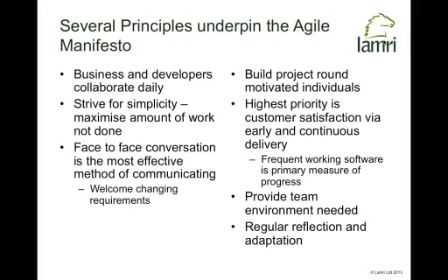Face-to-face communication is the most effective way of communicating. So this is kind of a welcome conversation and collaboration, and it's not traditional project collaboration. Collaboration tends to be high at the very beginning of the project, drop right down to a low point, and then get high right at the end.